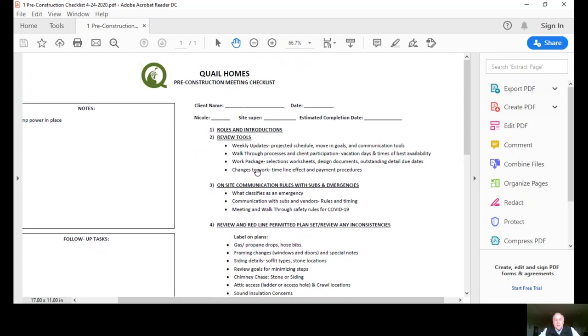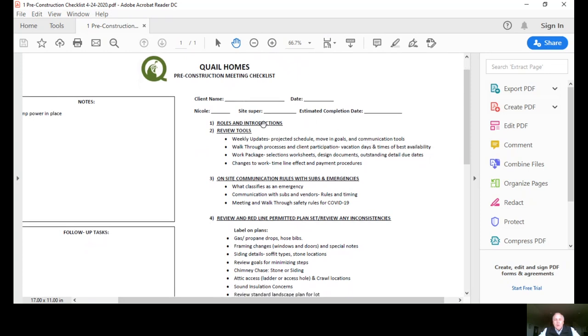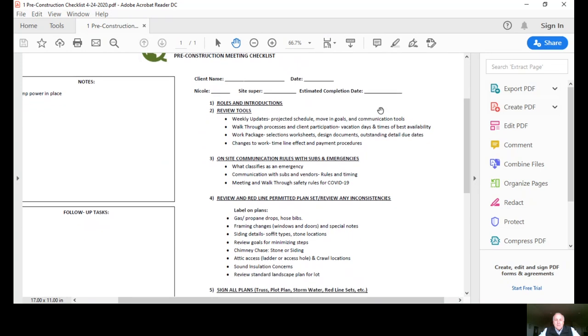This form asks for your name, date, and who is there. Nicole is our designer or the site superintendent and the estimated completion date would be installed right there. The first topic on the agenda would be roles and introductions, just make sure everyone gets comfortable with each other and who does what.